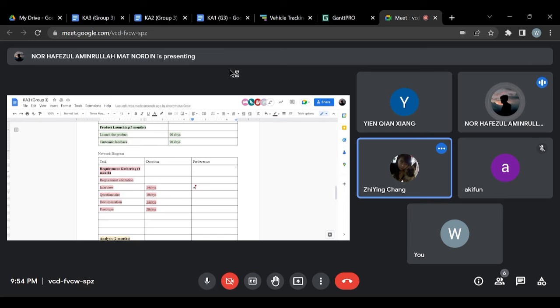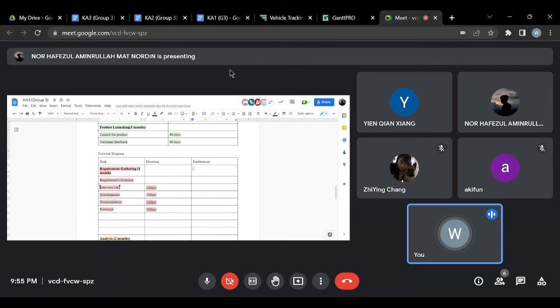Interview, then questionnaire. You should put beside interview, in brackets, A, because if you start with interview, it will not have a predecessor. So the questionnaire will be B.